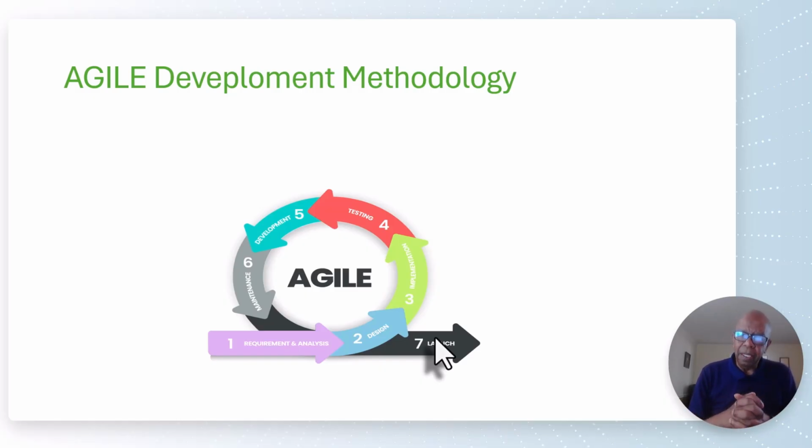In fact, with Agile, we plan out on purpose that we're only going to do enough work for this development that will fit in a 2 to 4 week time frame. That is kind of driving how big that interval is. How many requirements am I going to get? We're going to take the approach that we have a 2 to 4 week window in order to do work. And what we're going to tell the user is how much we can do in that 2 to 4 weeks and what we're going to deliver to the user in that time that is of value.